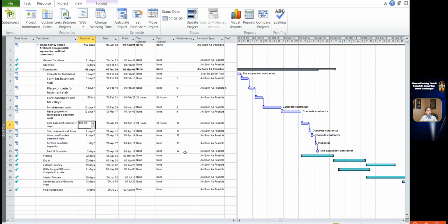You may notice that the duration have question mark. In Microsoft Project, few people know there is two types of duration. One is estimated duration, another is planned duration. Before you make a final decision for the duration, I advise you use estimated duration with a question mark.